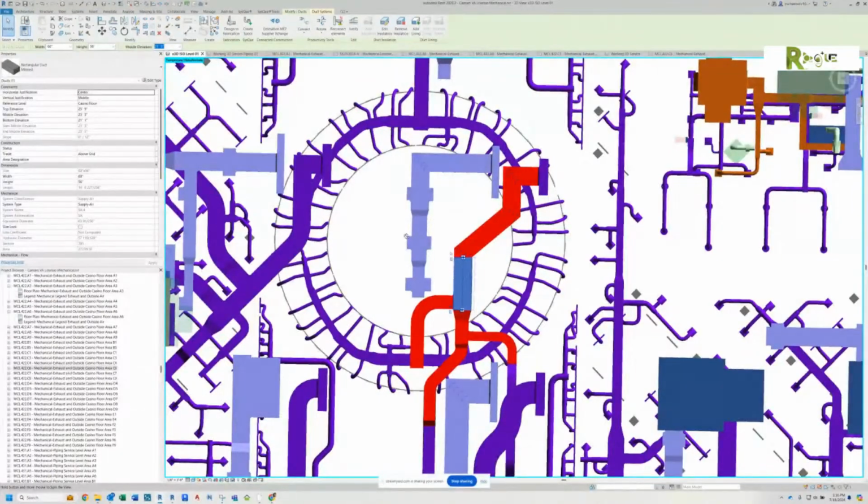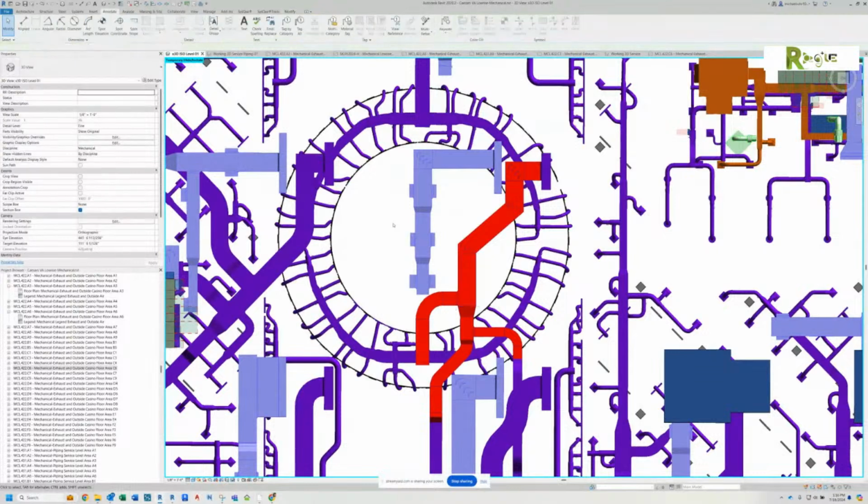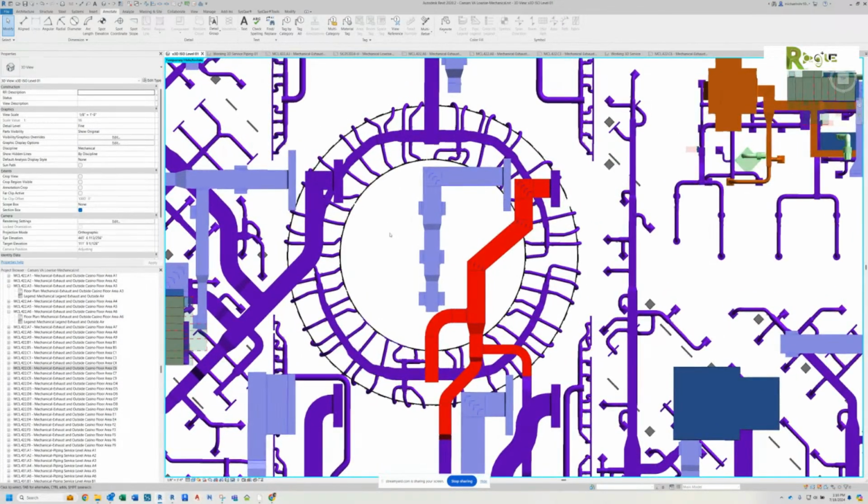Mike was laughing because that's supposed to all be below the secondary grid. Yeah. They'll have fun with that. Well, they'll cuss us again. It's okay. Yeah. Won't be the first, won't be the last. We've been running all of those like that, and they've been working around them. They want us to run our duct first, and then they build the bulkhead to it. We've done all these bulkheads like that.